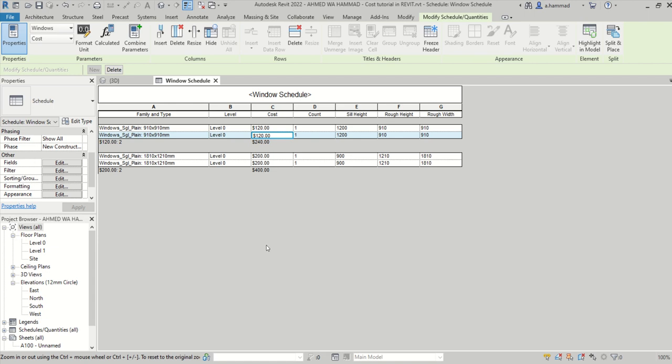So you don't have one cost associated with a wall, but you rely on the unit cost per meter squared, for example, of a specific wall type. Or maybe you have the cost of the material that's utilized in the wall, so a meter squared cost for the material that's utilized. So it's slightly a different approach, and I'll show you how we do that.